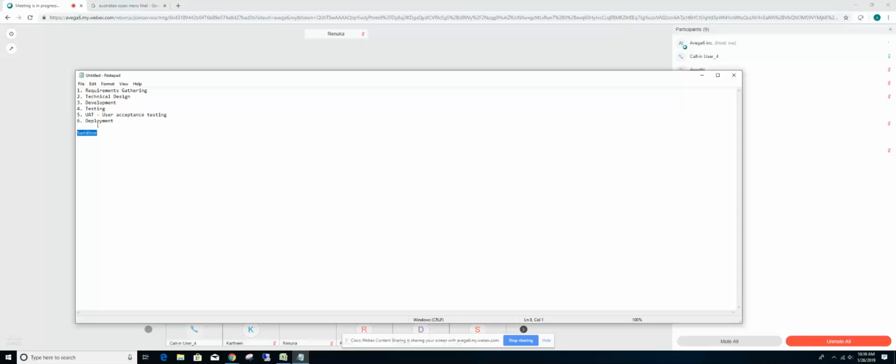So when somebody asks you to make some change, or to write some code, you would never write directly in production. You will always develop it in one of the sandboxes, make sure it is working fine, and get the approval from the QA team and the user acceptance team that everything is looking good. And that's when whatever development you have done will be deployed into the production environment.